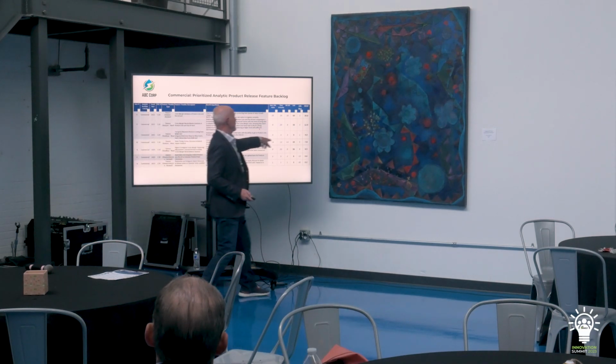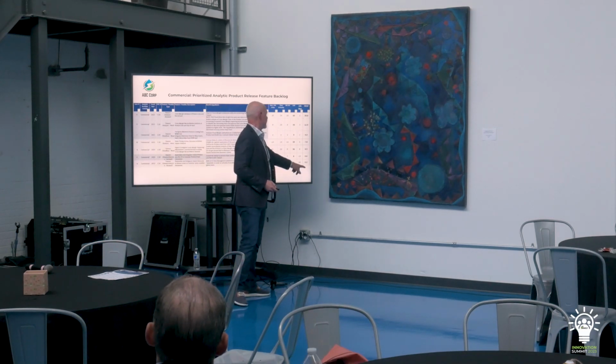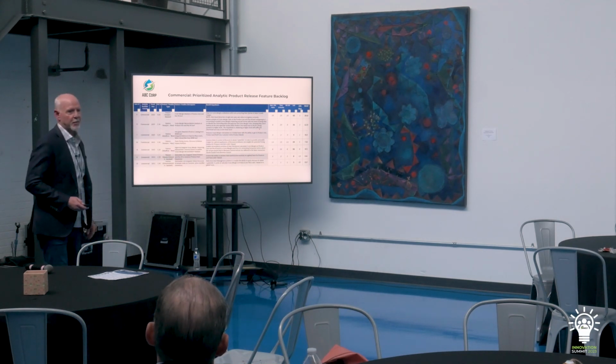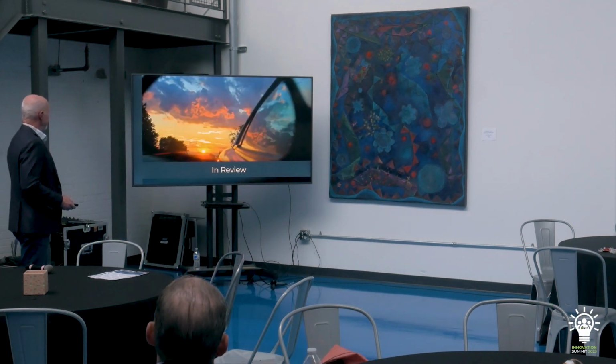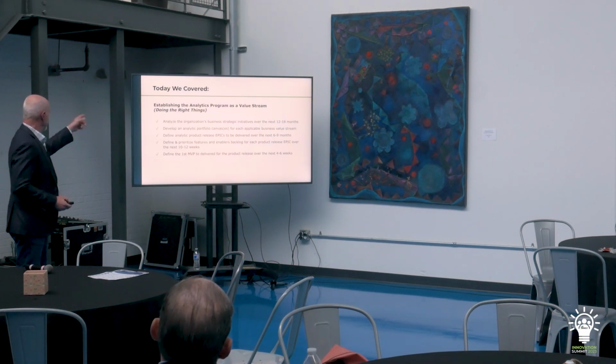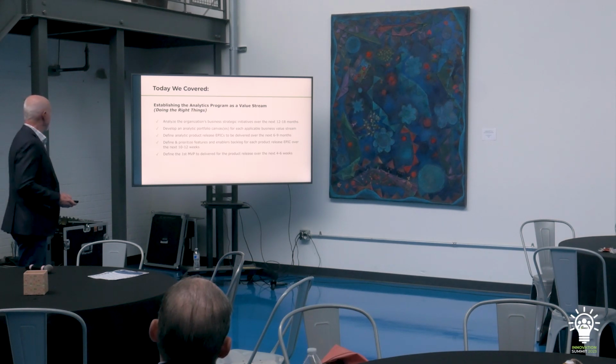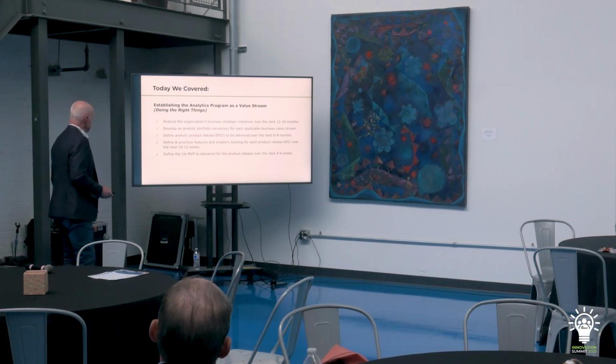So then you sum this up, you divide it by the job size, sort it descending, that's your candidate right there. That's the first one we ought to build, okay? And then you do the same, I'm not showing it here, but you would do the same thing for the architectural enablers, right?